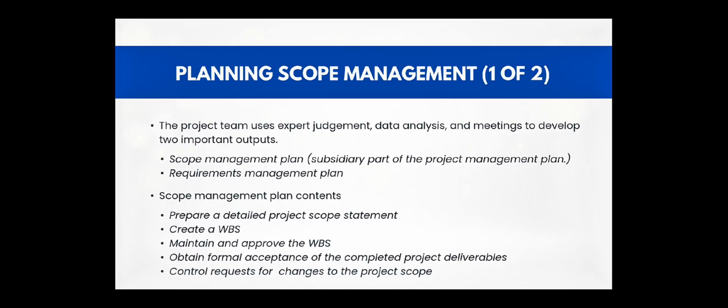Fourth, obtain formal acceptance of the completed project deliverables. It is extremely important to understand the process for obtaining formal acceptance of completed deliverables, especially for projects in which payments are based on formal acceptance.